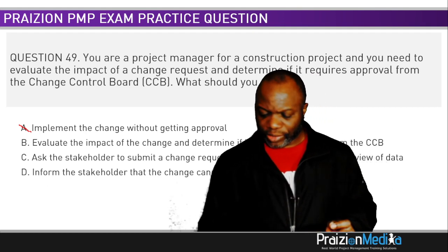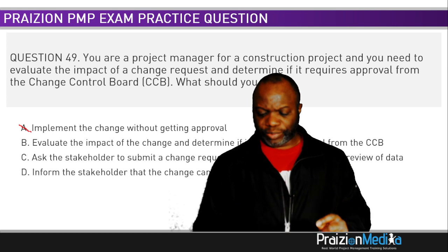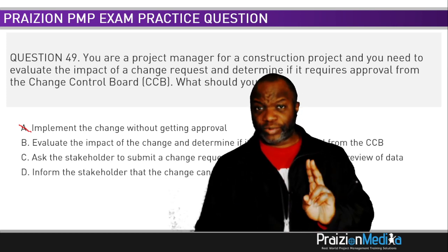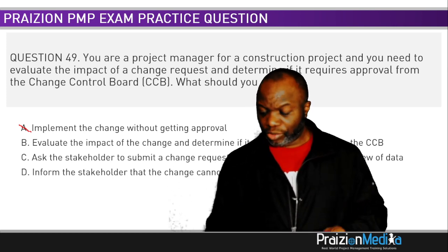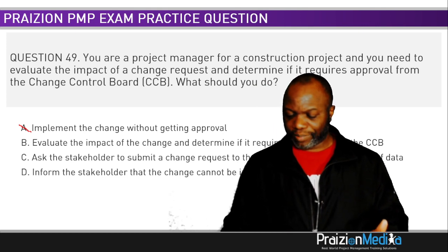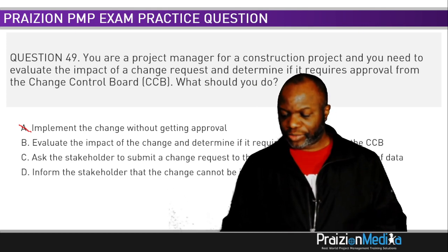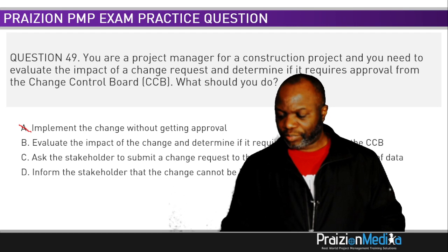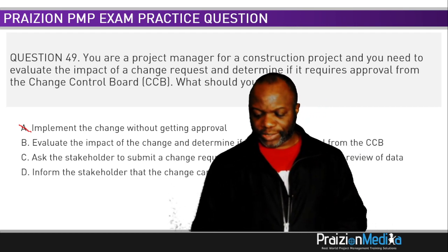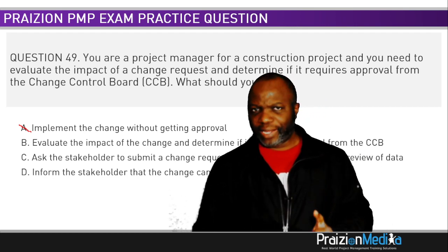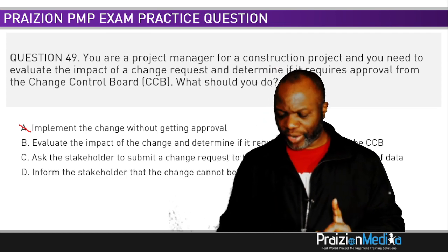It said every documented change request needs to be either approved, deferred, or rejected by a responsible individual, usually the project sponsor or project manager. The responsible individual will be identified in the project management plan or by organizational procedures when required. You see that? When required.